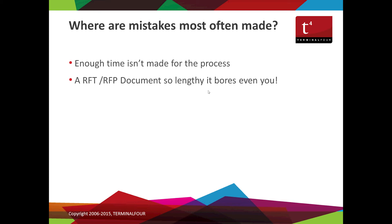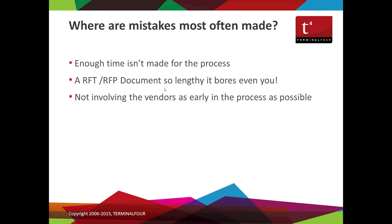There are tips I'll share today about how to speed things up, like purchasing frameworks. Another problem is that if you gather input from across the organization, you can end up with an absolutely huge RFP document. Keep in mind that the response you get back from every vendor is probably going to be three to five times the size of the document you share. If you share a 100-page document, you're probably getting a 300 to 500-page document back — and if you're evaluating that from multiple vendors, that's a lot of work.